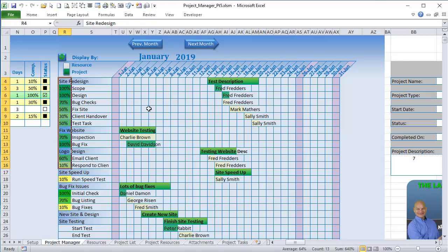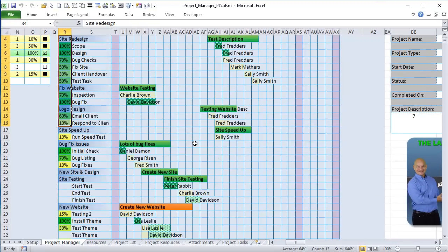Any job that starts in this January of 2019, any job or project that ends in January, or any job that starts before this particular month and any job or project that ends after. If we have those two conditions, something that begins before and finishes after, we also want it contained in this particular month. So that's important. So those are the three conditions.